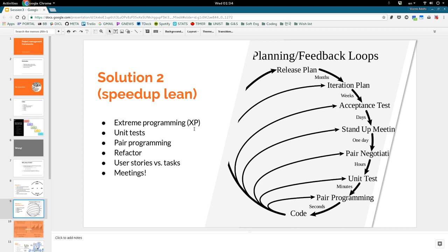As a schedule, it's different stages over time. We substitute the requirement step with a release plan. So in the release, we have this little table, and we say, okay, by these dates, we're going to deliver this feature. It's a roadmap, simply speaking. And then over time we have a few things that we're going to deliver every so often. To deliver those features, we divide into iterations.